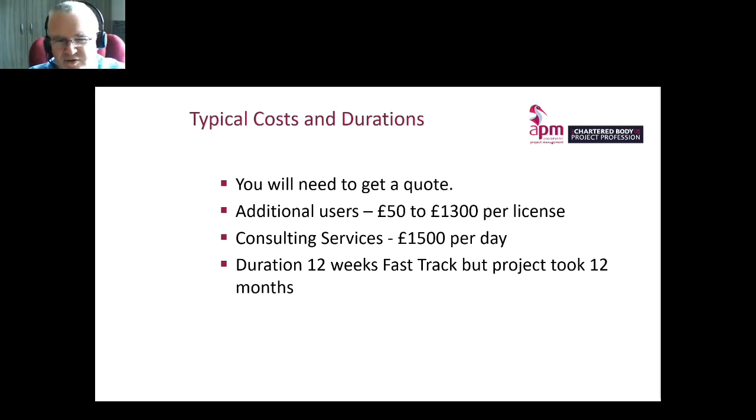much these things cost. So the licenses, there were three sorts of licenses, and they range from £50 to £1,300 in terms of the type of access you wanted. The £1,300 was for an administrator, £50 was just for a normal user who couldn't change anything but could view things. In terms of the consulting services, like I said, this was 2 years ago, it was around about £1,500